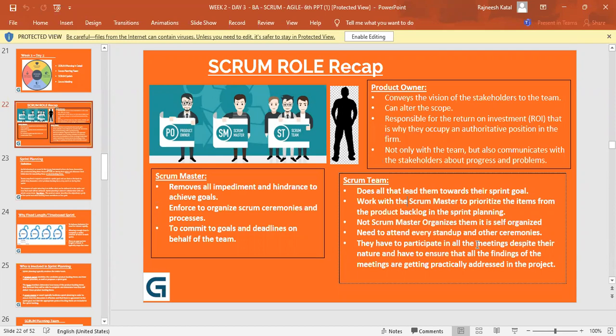So for example, assuming the customer said no to the group chat of 8 people, like we have on WhatsApp, and says, okay, not 8 people, I need at least a 4-person group chat. Now, that is what we want to achieve, and the Scrum team will work on it and achieve this, right? So that is why the sprint goal would be developing a 4-person group chat. Okay, so this is their goal.